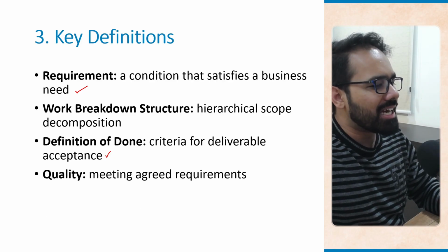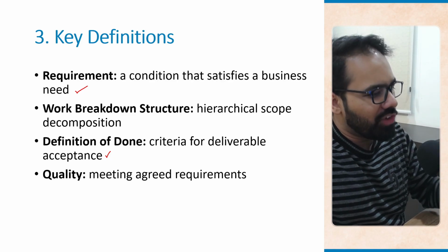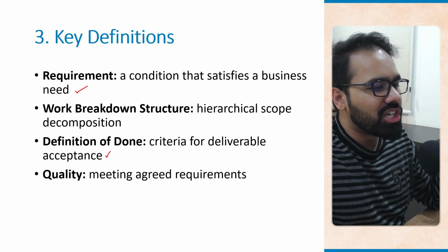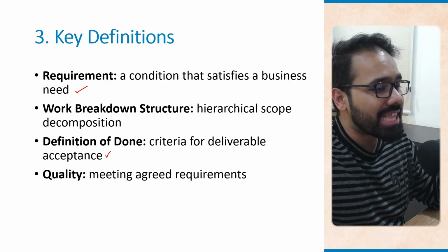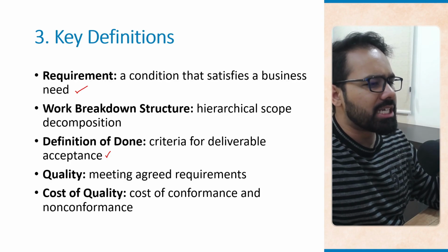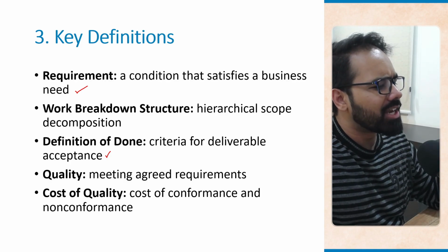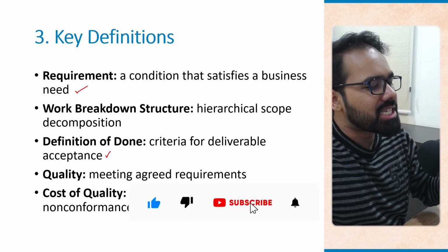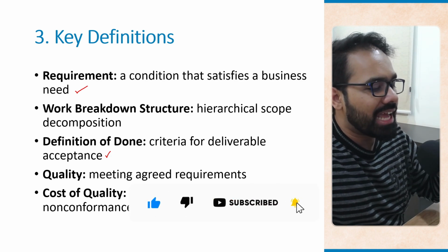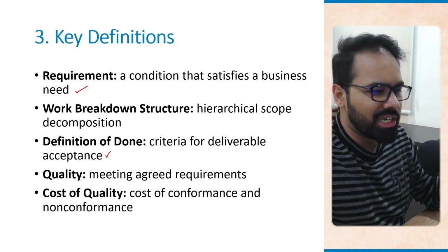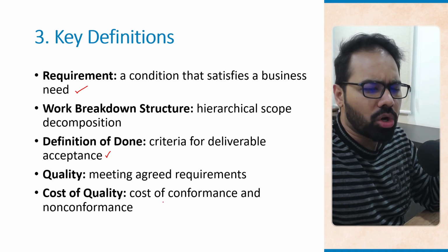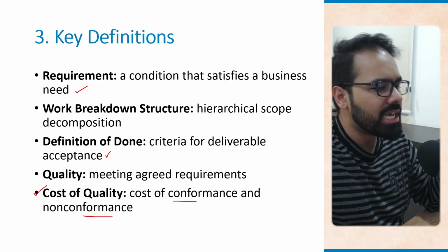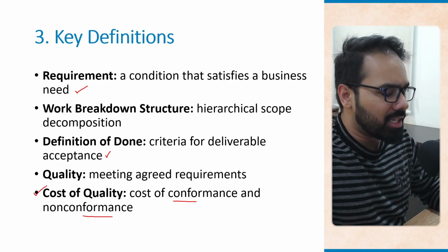Quality, meeting agreed requirements. If the checkout fails during peak load, quality is not achieved even if the feature exists. So quality is that important. Cost of quality is basically cost of conformance and non-conformance. Investing in testing early prevents expensive fixes later, like refunding customers due to payment failures, right? In fact, we have a video on cost of conformance and non-conformance, which makes up the cost of quality. I'll share that video link in the description below as well.